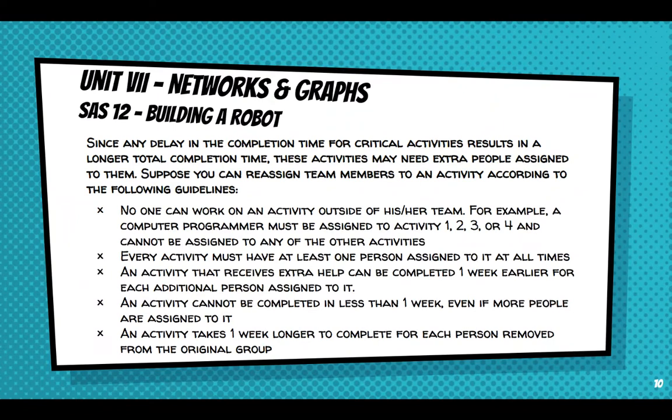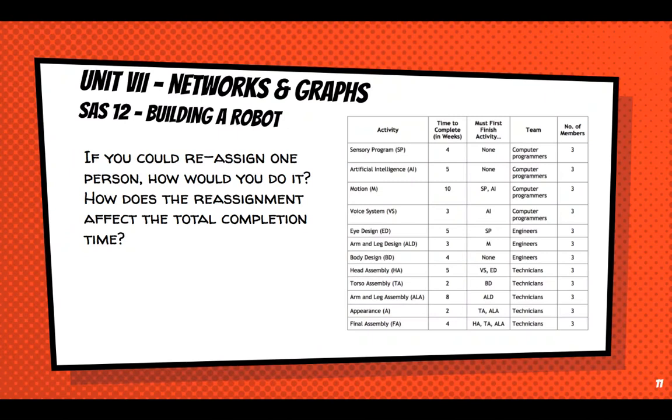All right. Since any delay in the completion time for critical activities results in a longer total completion time, these activities may need extra people assigned to them. Suppose you can reassign team members when they're finished with the activities already on to an activity according to the following guidelines. No one can work on an activity outside of his or her team. So computer programmers can't work in engineering fields. Engineers can't work in technicians. Technicians can't work in computer programmer engineering and so on. For example, a computer programmer must be assigned to activities one, two, three, or four, all the ones that have computer programmer, and cannot be assigned to any of the other activities. Now, every activity must have at least one person assigned to it at all times. Can't go forward if you're not working on an activity. An activity that receives extra help can be completed one week earlier for each additional person assigned to it. And then an activity cannot be completed in less than one week, even if more people are assigned to it. And finally, an activity that takes one week longer, or an activity takes one week longer to complete for each person that's removed from the original group.